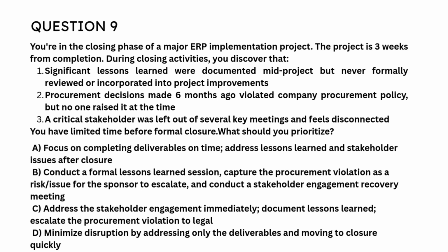Correct answer is B. Conduct a formal lessons learned session. Capture the procurement violation as a risk issue for the sponsor to escalate, and conduct a stakeholder engagement recovery meeting.